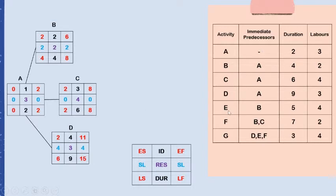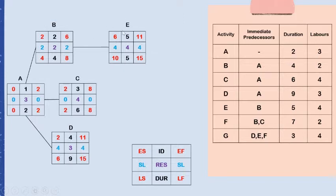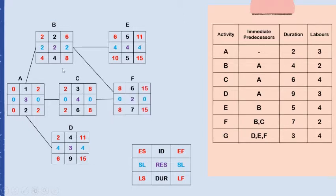To proceed to activity E, we need to complete activity B first. So the earliest start of activity E is six and the earliest finish is eleven, from six plus five. For activity F, the immediate predecessors are B and C, so both must be complete before F can start. The earliest start of activity F is day eight, even though B finishes on day six, because C does not complete until day eight.